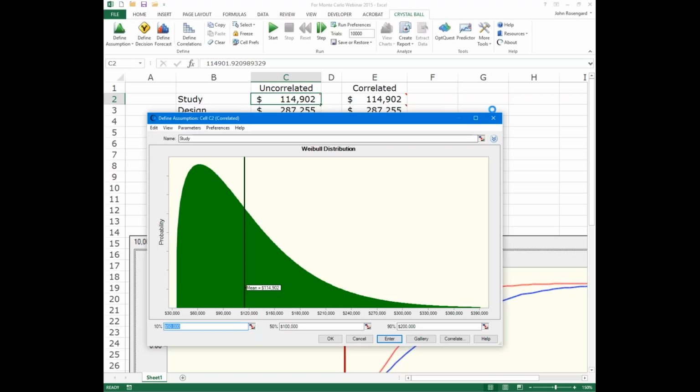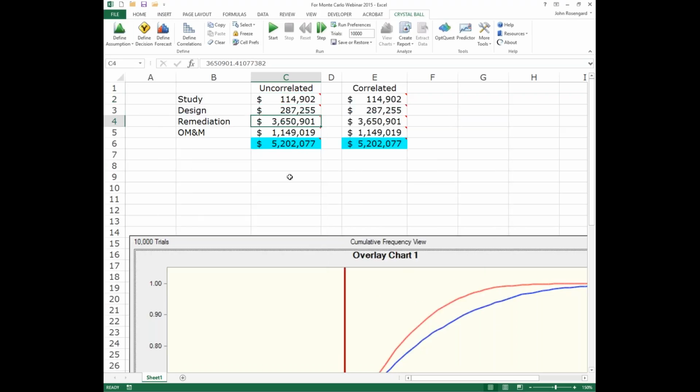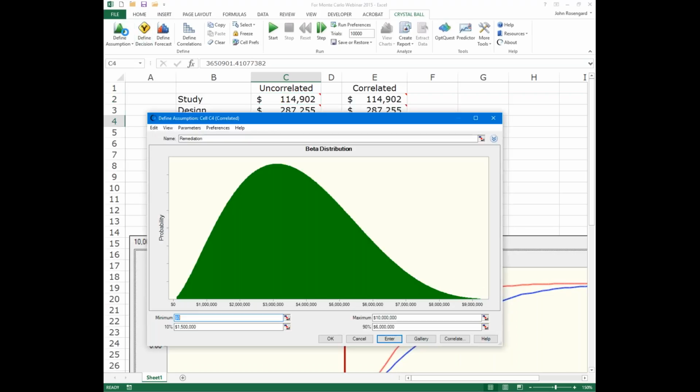The next step after this, once you've got your assumptions put in, is a critical step of correlation. I'll step aside and say this is one of the more common user errors for using Monte Carlo tools: to skip this step. If you don't do this, the other variables in your Monte Carlo modeling will behave independently and randomly against one another.